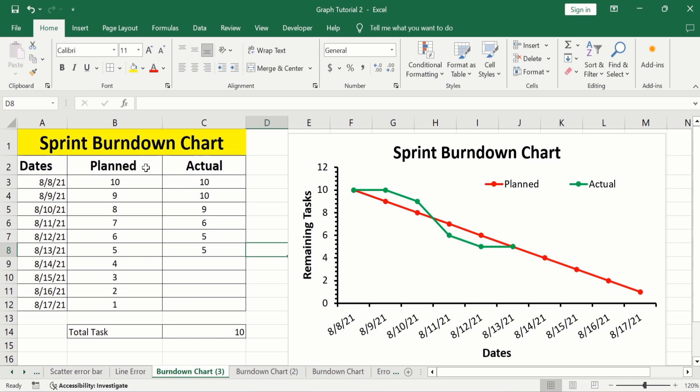This is three-column data. The first column shows the dates, the second column shows the planned work or ideal trend, and the third column shows the actual work. So if you are interested to generate a burndown chart, you should have three-column data.